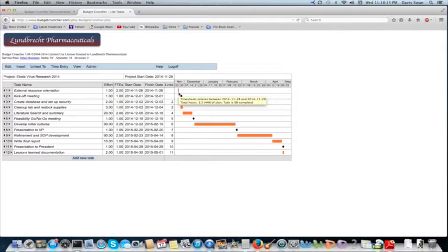The timesheet indicator on our Gantt chart is pink, indicating that the work is not proceeding as planned. By hovering the mouse over the indicator, we can see that 3.5 hours have been billed to the task, but the task is 0% complete. That is because we have not updated the status of the task.